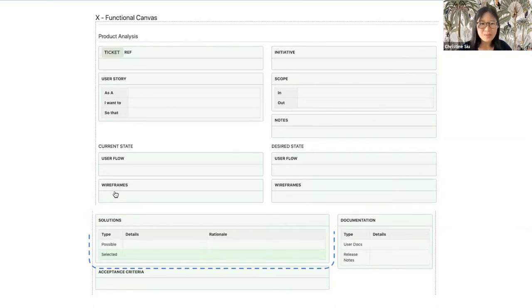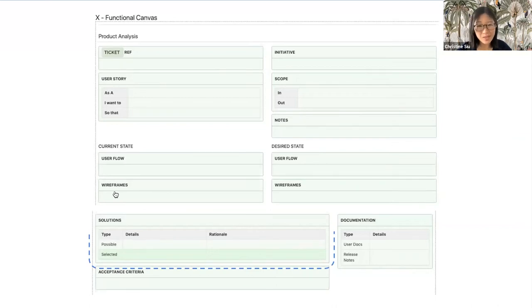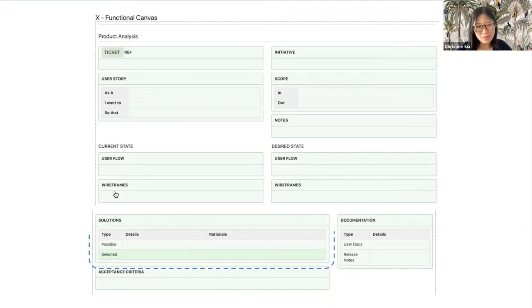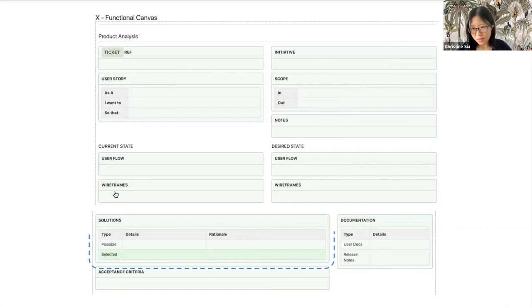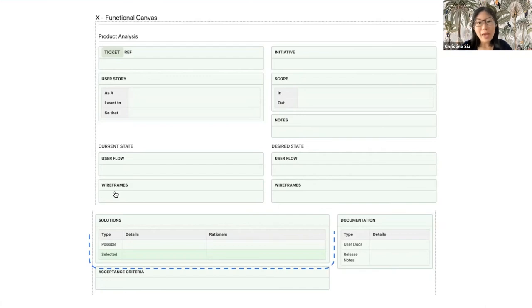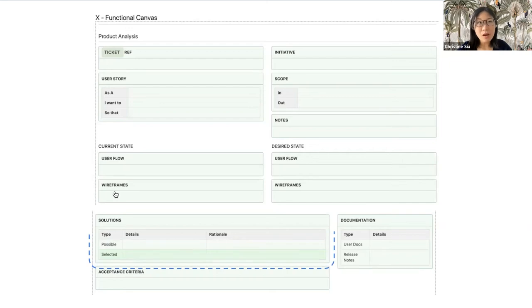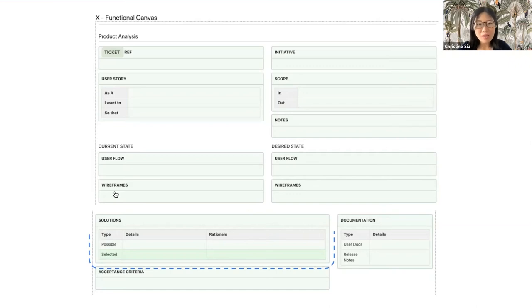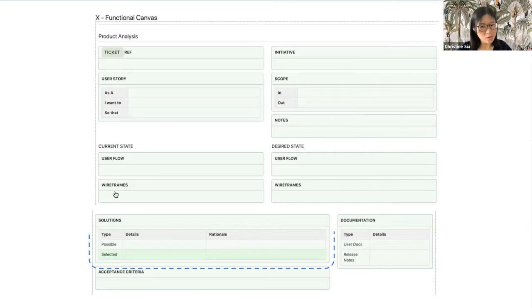Acceptance criteria. This is so important and underrated. Think of them as how you would test. Acceptance criteria should be statements that, when tested, will result in a clear pass or fail state. For my app scenario, one I can think of is, given I am a logged out user, when I launch the app, then I am shown two sign-in options, Google and user credentials.